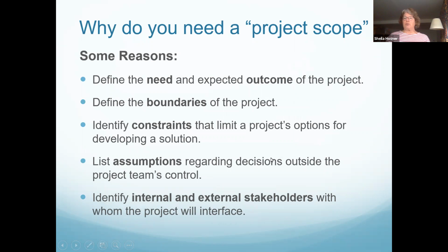Why do you need a project scope? I'll let you read this yourself, but most importantly, you want to define the boundaries of the project. Defining the boundaries of the project will help you eliminate what's called project creep. If you don't define the boundaries of your project, you're likely to go over them, and your project will creep. It will get bigger and bigger. This way, it helps you stay within the boundaries that you've defined.